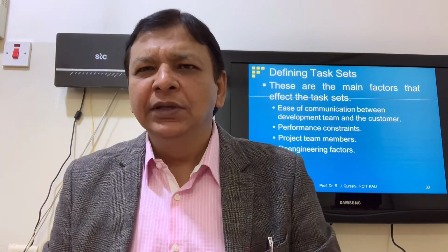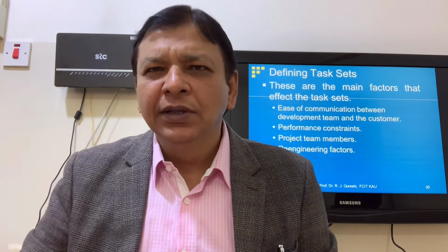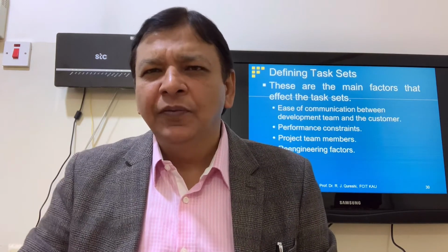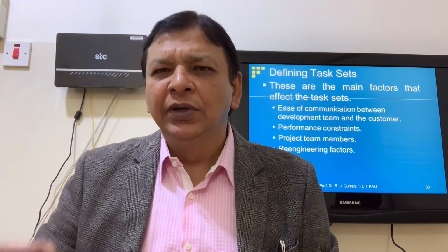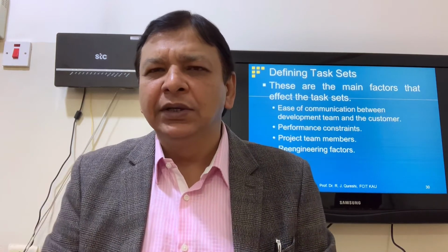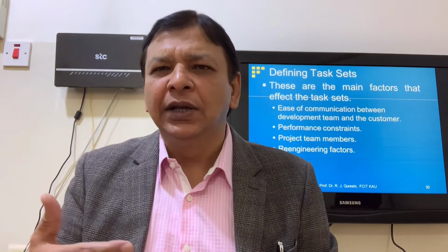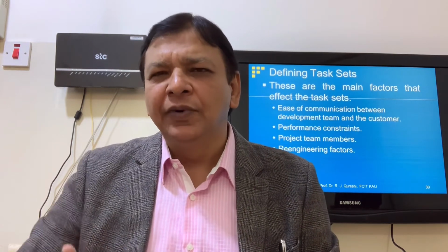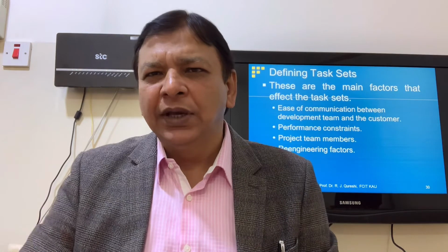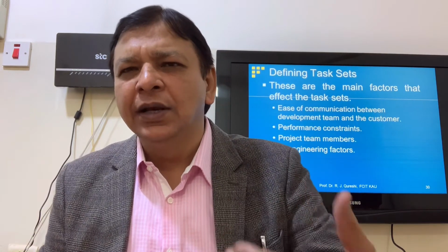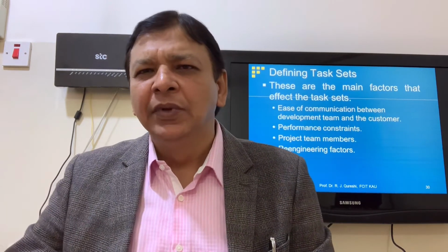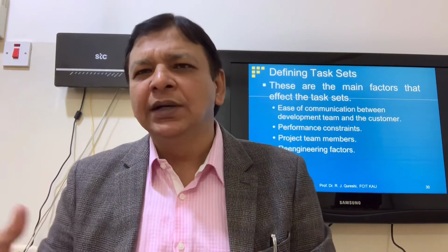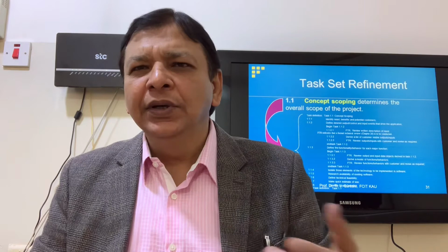Then you have re-engineering factors. If you are doing re-engineering, redevelopment, then you need double effort. First, you have to apply reverse engineering: you will take the code, from the code you will generate the design, from the design you will generate the analysis, you will collect the requirements, then you will do the planning, then forward engineering, then forward cycle analysis, then design, then implementation in the new tool, like from a Java-based system to a .NET system. Double effort is required, so task sets will be different. Then you have different scheduling techniques.